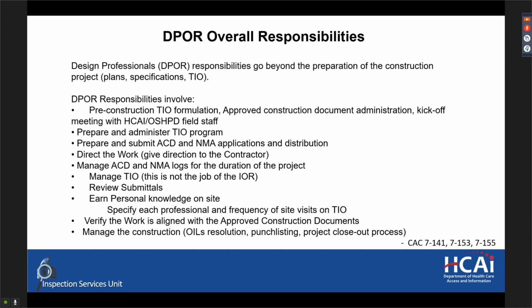The frequency of these site visits should be communicated to OSHPD field staff, so we have a better understanding as to how often the DPOR and alternates or delegates are coming out to observe the work, so they get a better understanding of what may be going on in the field rather than just relying on pictures or RFIs. It's better to be on site to actually visually and physically discern changes to the work.